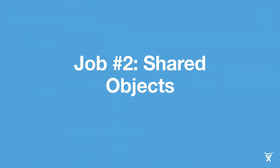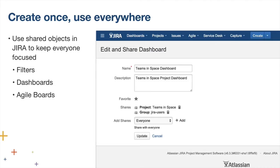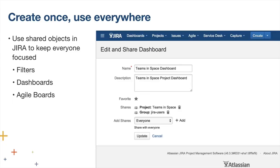How many of you are program or project managers? Quite a few. So shared objects are your job. Shared objects are those entities in Jira like dashboards, filters, wallboards. Be the champion of those entities for your team. Don't let people necessarily create copies of the project dashboard. Be the champion to create it, listen to your users, make changes so that you become the source of truth for your program. Always point people to that particular dashboard because that dashboard becomes the source of truth for your program.